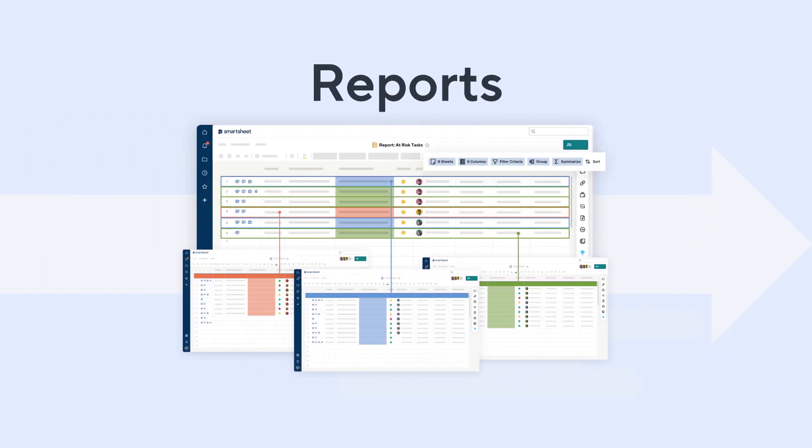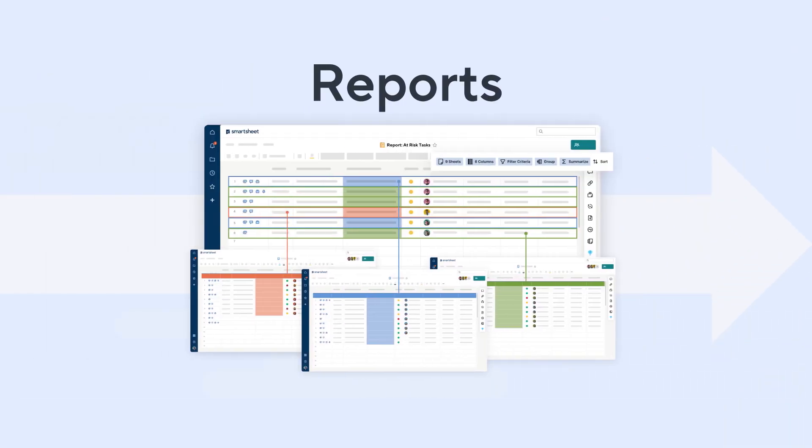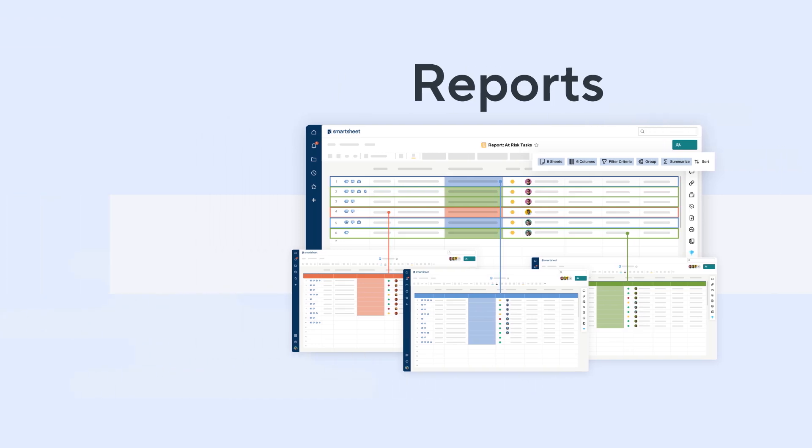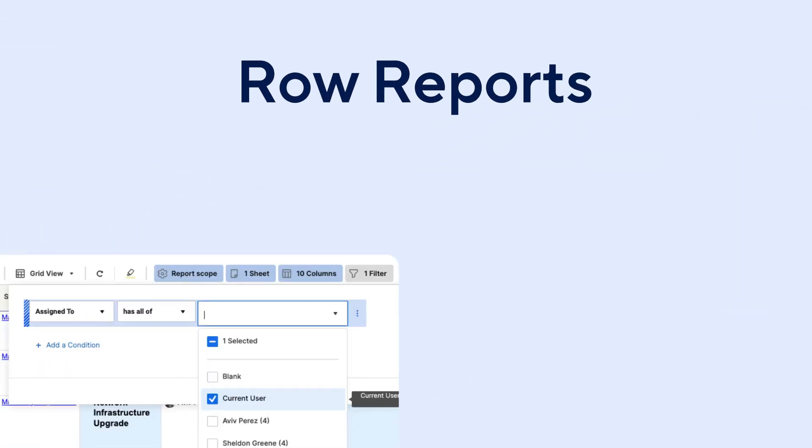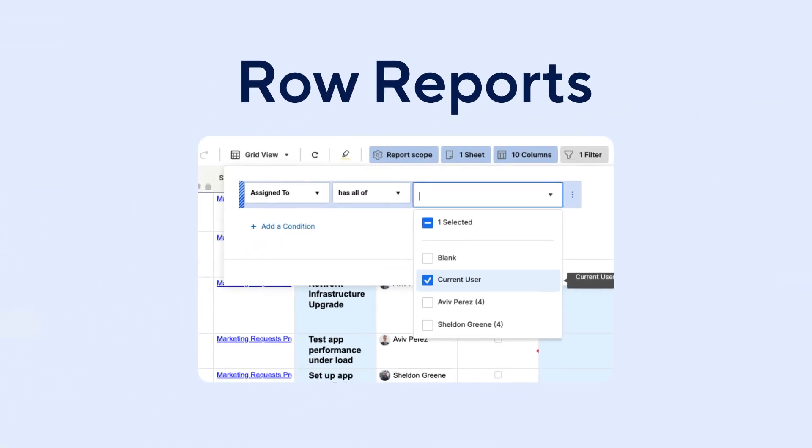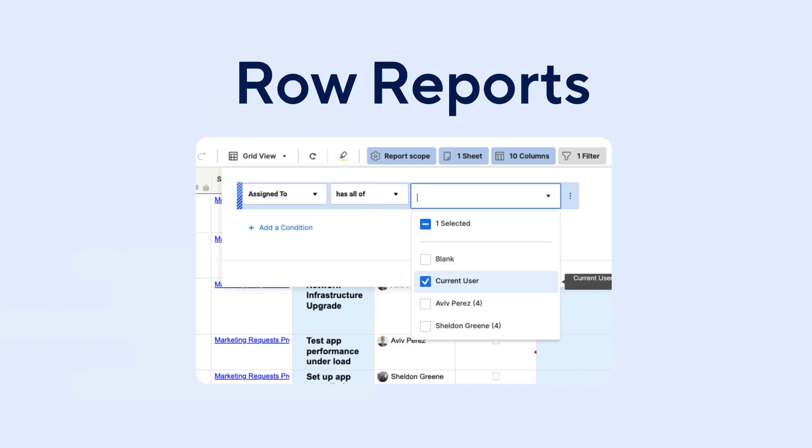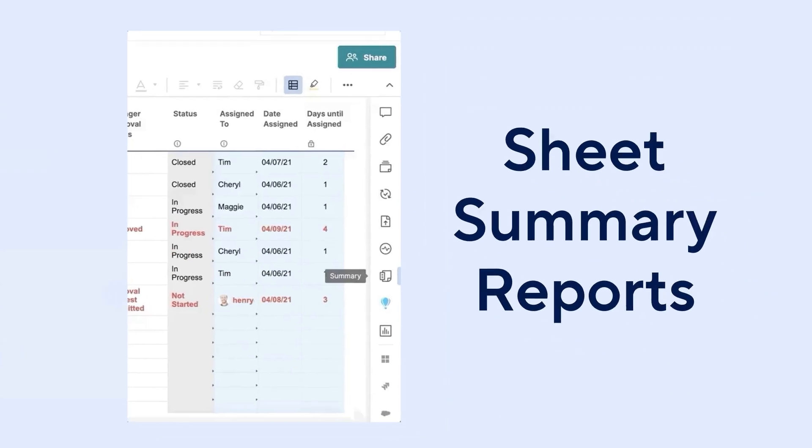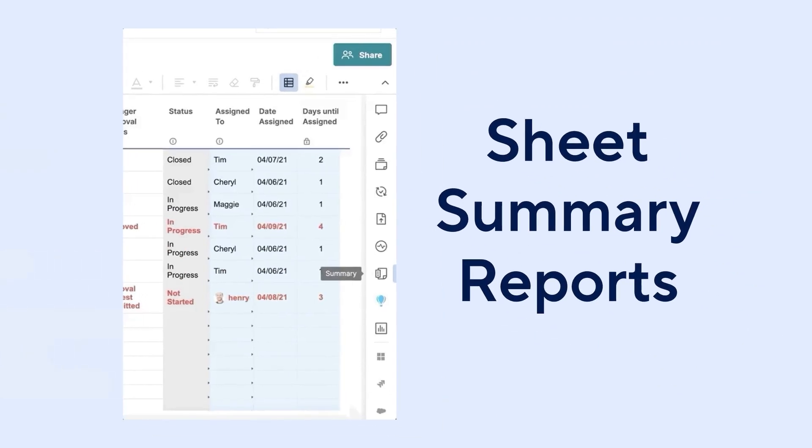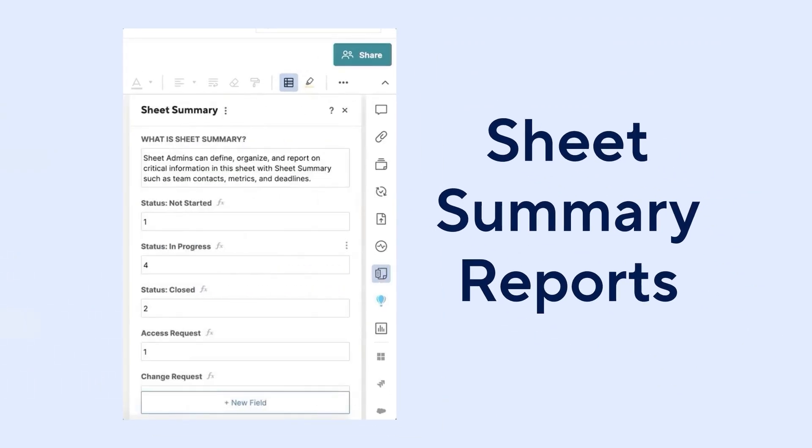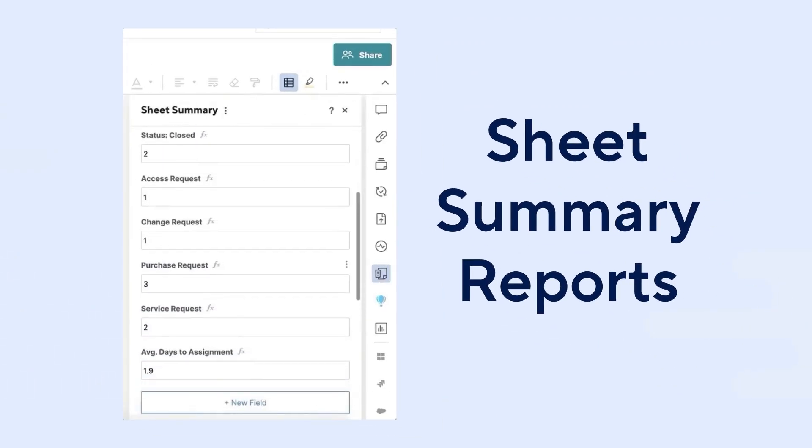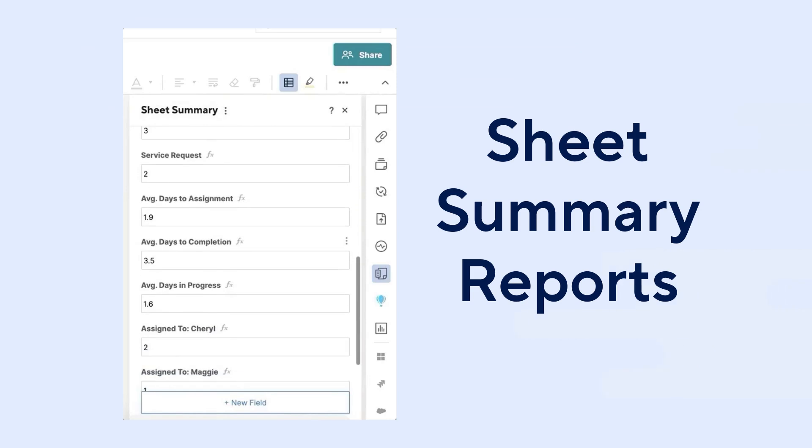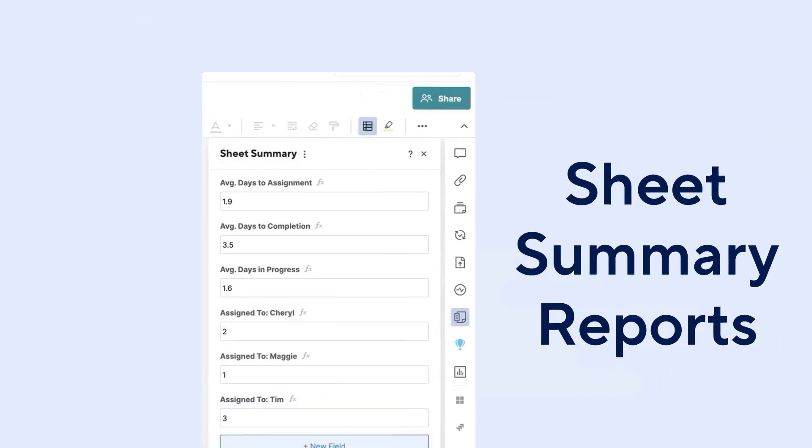Next let's look at custom reports. Smart sheet reports provide tailored views to track progress, analyze data, and align teams. There are two report types, row reports and sheet summary reports. Row reports pull data from sheets based on filters such as deadlines or status. You can configure the filters to only show data for the current user which makes them very powerful. Sheet summary reports pull data from the sheet summary section of sheets making them helpful in sharing high-level overview data.